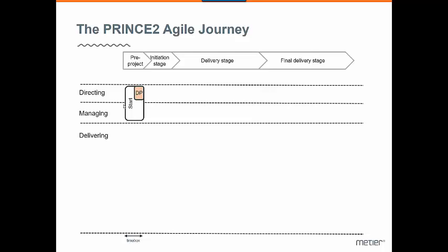And the next stage is the initiation stage. So directing a project, I put that within the starting of a project process. It is the formal decision at the end of that time box, and it's made by the project board that you have identified and organized as part of starting up a project. So that makes good sense.